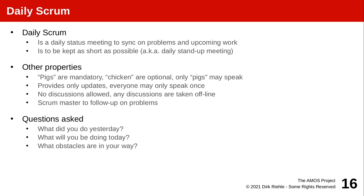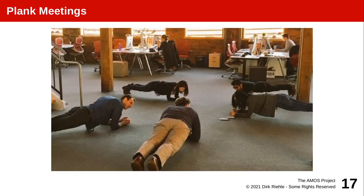So as just explained, the daily Scrum or the daily stand-up is a status meeting to synchronize problems and upcoming work. And the goal is to keep it short. So 10, 15 minutes usually. And you do a roll call where you say what did I do yesterday, what am I going to do today, and what are my current problems. Only the committed people, the pigs, as you may remember from that Scrum joke, may speak.